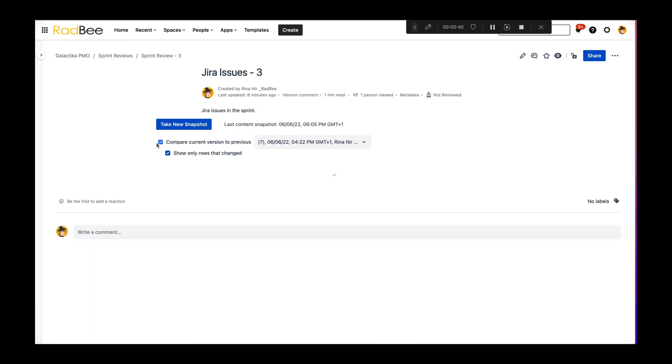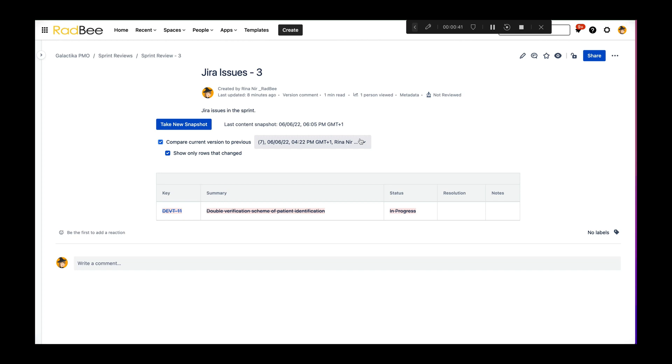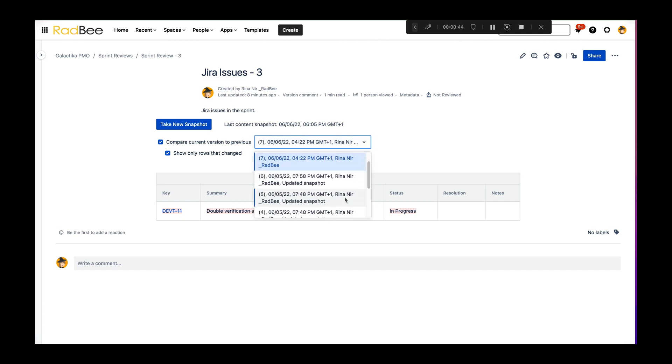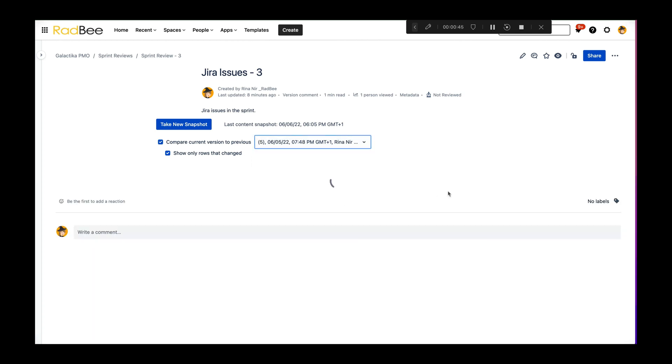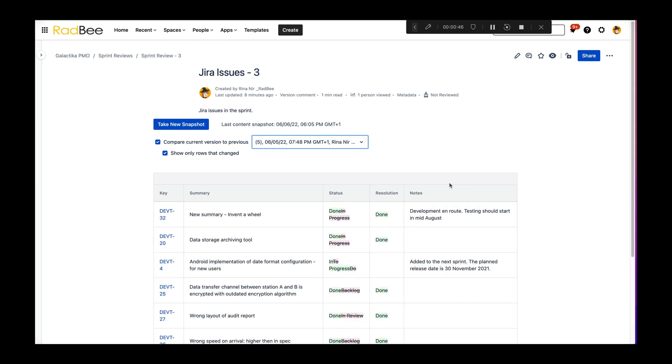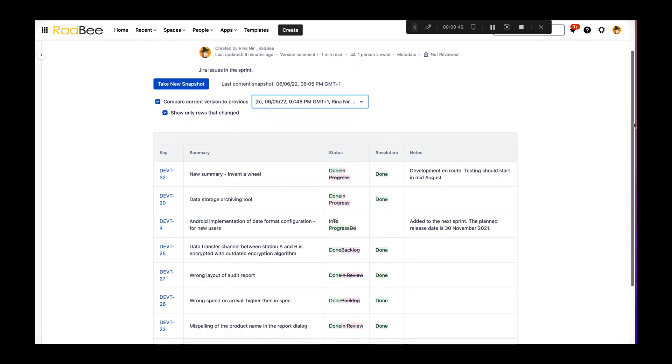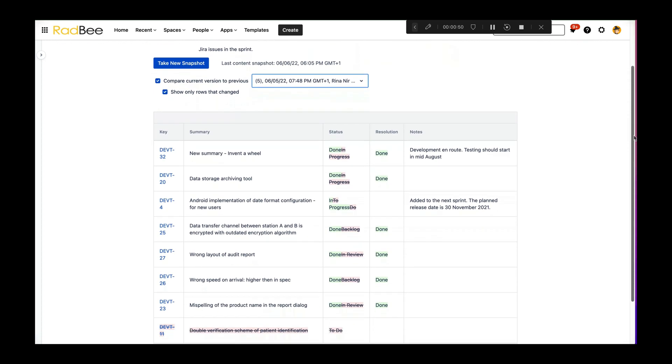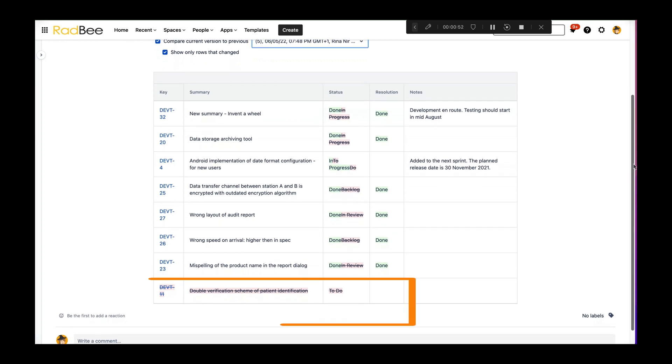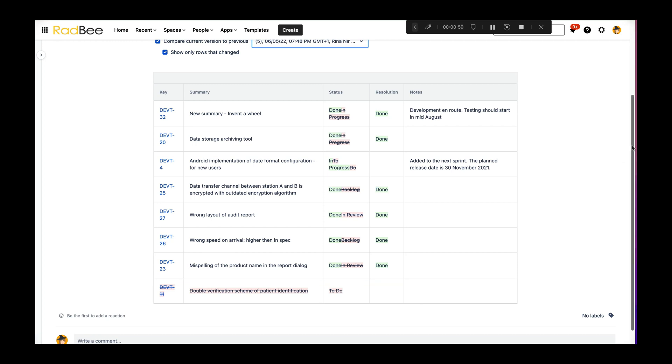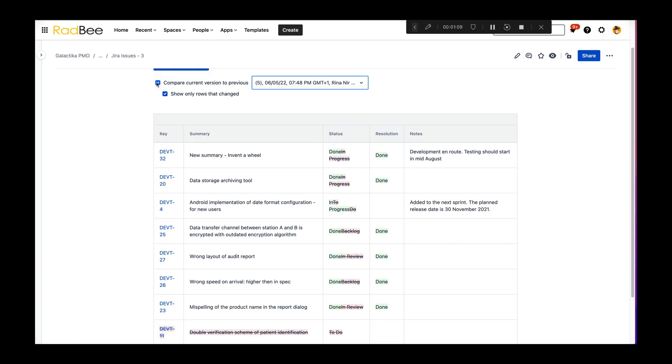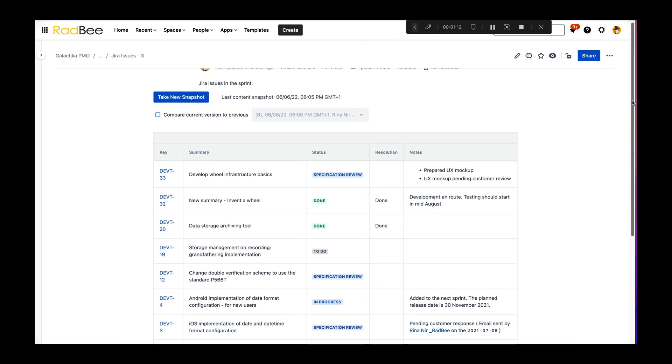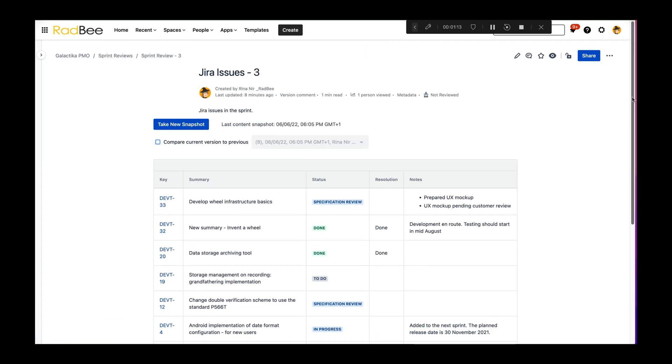This makes it easy for everyone to compare between what was initially in scope for the sprint and what we have actually achieved. Here we see the status changes, but also that there was one story that was altogether removed from the sprint. This kind of visibility helped us not only build more trust with our stakeholders, but actually saves us a lot of discussions and disputes.